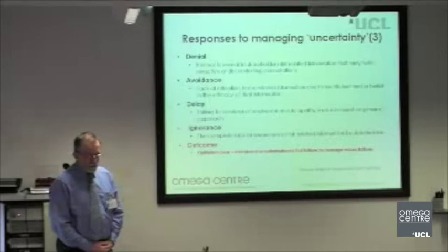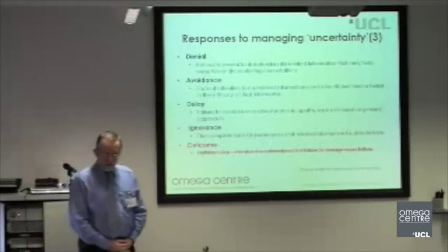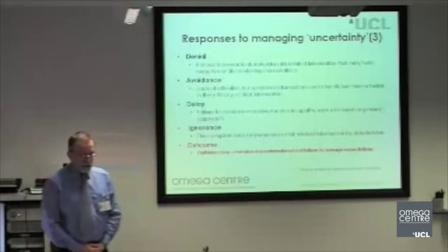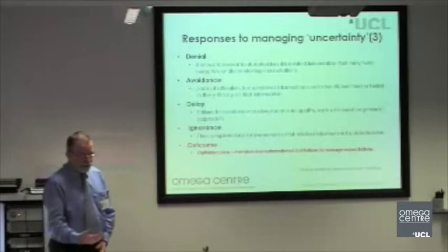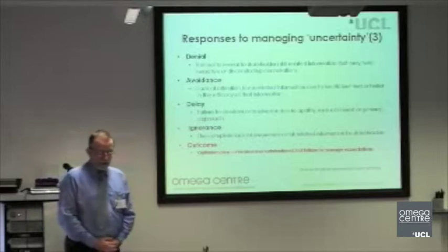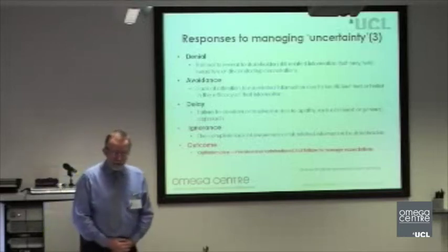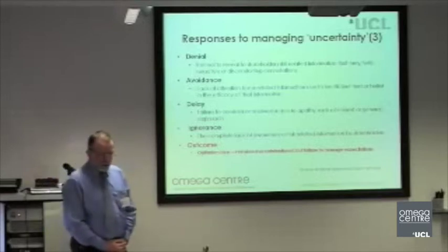And one of the outcomes that we find in a number of situations is this issue of optimism bias, by intentionally or unintentionally failing to manage expectations. If you're denying this, failing to respond adequately to uncertainty, there is a tendency to be over-optimistic about outcomes or delivery.